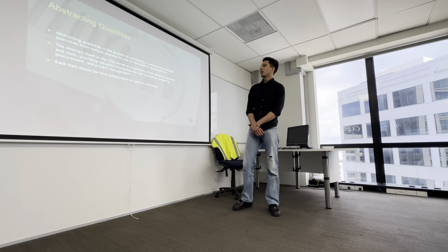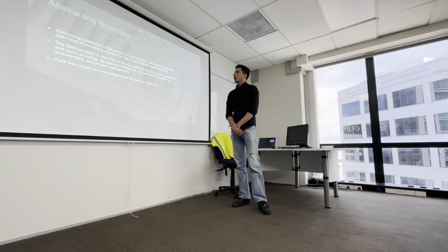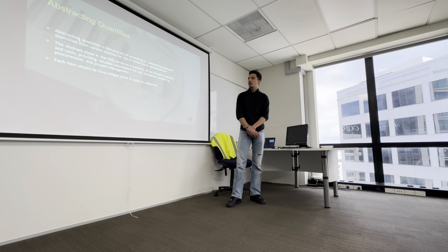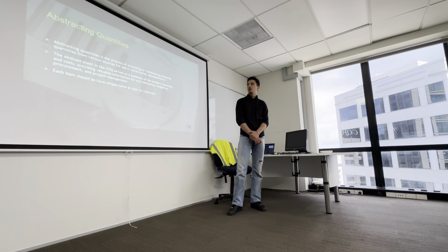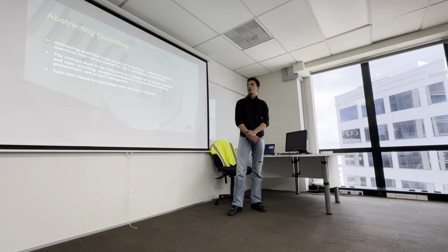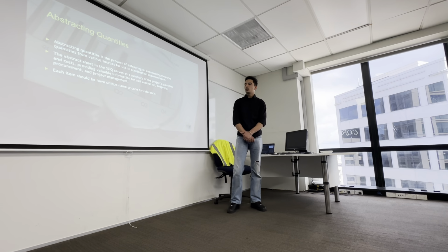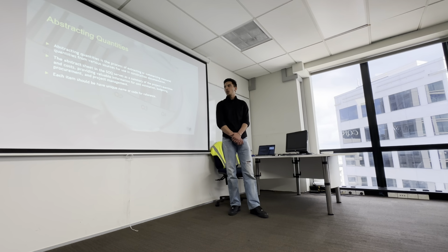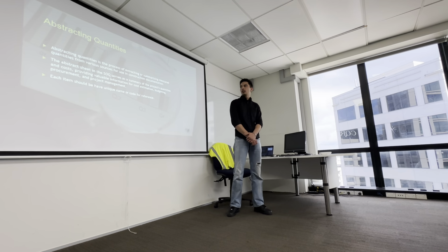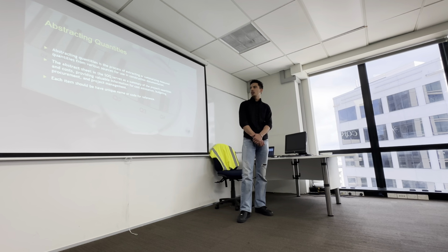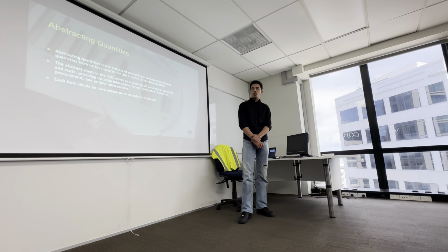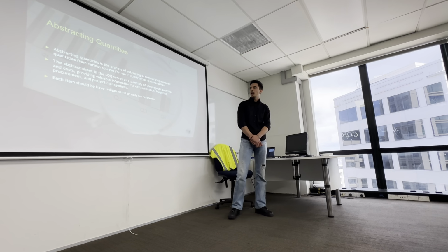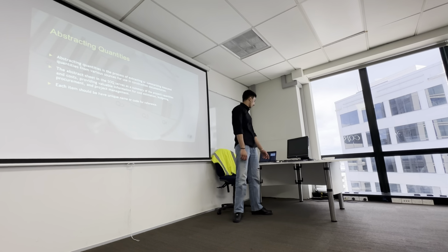Abstracting quantities. Abstracting quantities is the process of extracting or summarizing measured quantities from various sources for use in construction documentation. The abstract sheet in the SOQ serves as a summary of the project's quantity and cost, providing valuable information for cost estimation, budgeting, procurement, and project management. Each item should have a unique name or code of reference.